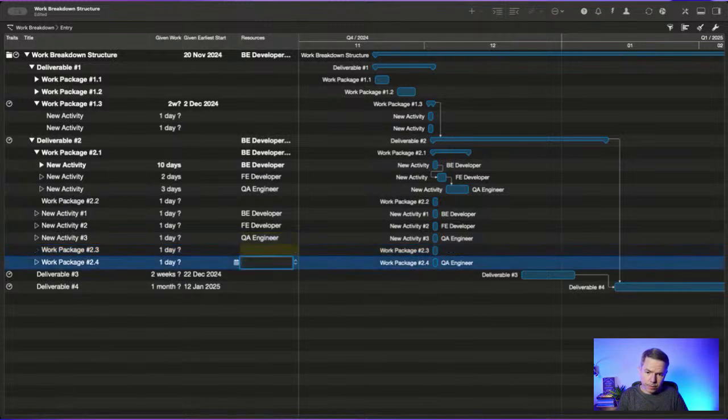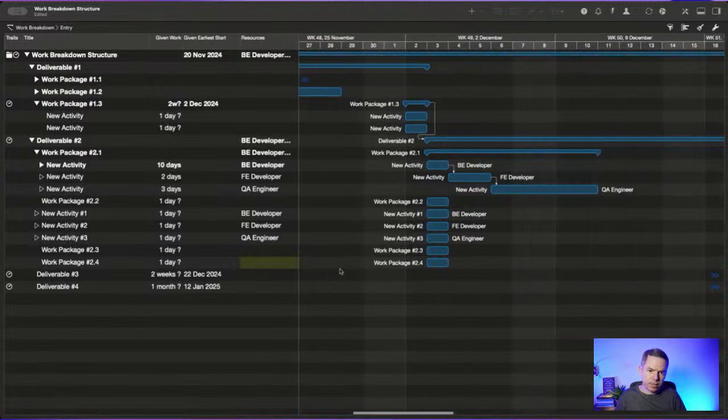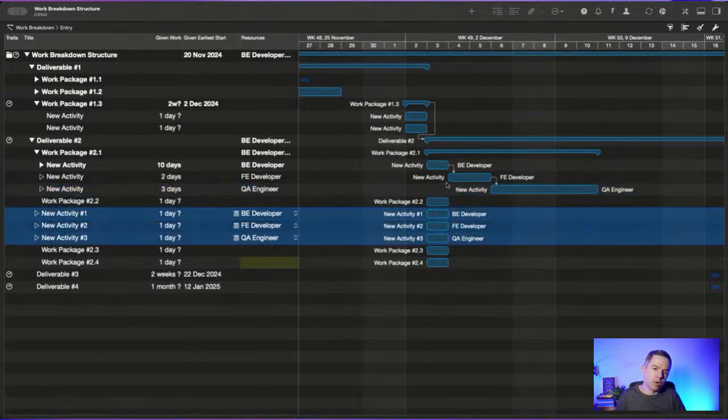So we may notice that we can do it much more efficiently. And that's why there is one critical concept that you need to understand. Even if tasks don't have a mandatory or technical dependency, there is no sequence in them, you should assign them just to know which tasks go after which. You create a structure yourself, which is convenient to you.